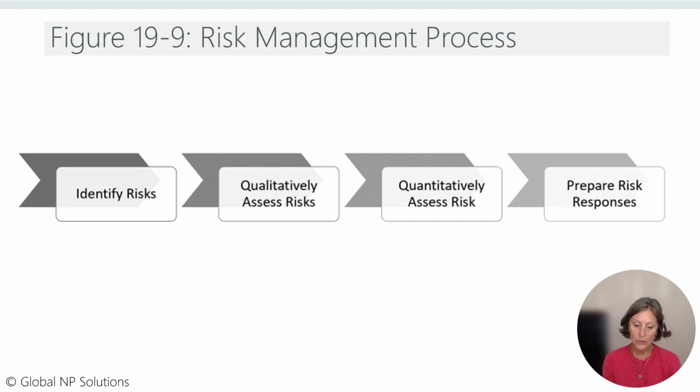Impacts of risk are minimized when uncertainties are identified and addressed earlier rather than later in an innovation project. As development of the new product advances, risks become more complex and expensive to mitigate. However, in lean product development, removing all risk is balanced against the goal of flexibility and not locking design standards until as late as possible. Freezing the design too early can create insurmountable technical, market, or manufacturing challenges.